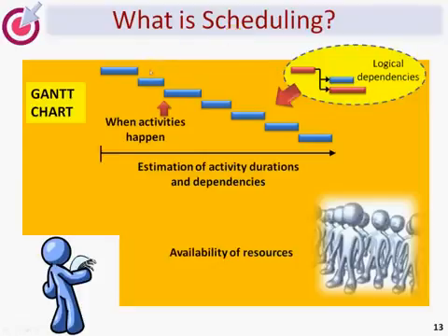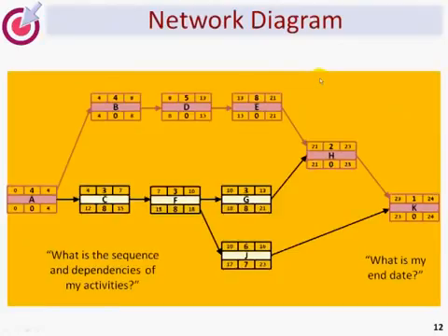And a Gantt chart shows the activities, and I've just done them as a very simple sequence here, one after the other, where the duration of each activity is shown as a bar against a time frame. So this might be calibrated in weeks, months, and so on and so forth. And here again would be the end date. Now if you looked at a real one of these in detail, you'd find little links like this showing logical dependencies. Unlike this simple diagram here, you would normally find that each task or activity would have link lines showing the logical dependencies, much like the previous diagram showed you the arrows and how each of the activities relate to each other.